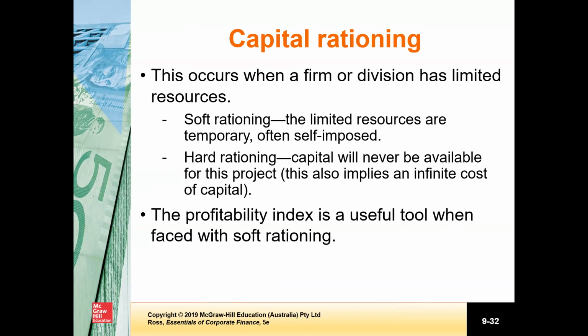First of all, let's talk about these capital rationing scenarios. Soft rationing, the scenario that we have just described, is soft rationing. This occurs when, for example, different units in a business are allocated some fixed amount of money each year for capital spending. Such an allocation is primarily a means of controlling and keeping track of overall spending. The important thing about soft rationing is that the corporation as a whole is not short of capital, but more can be raised on ordinary terms if management so desires.